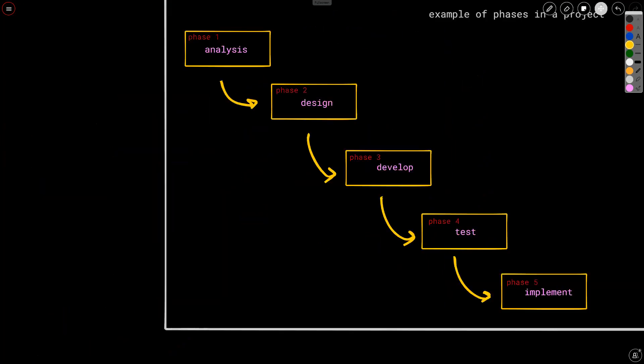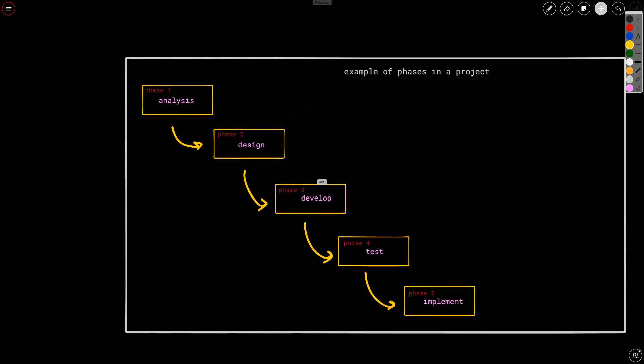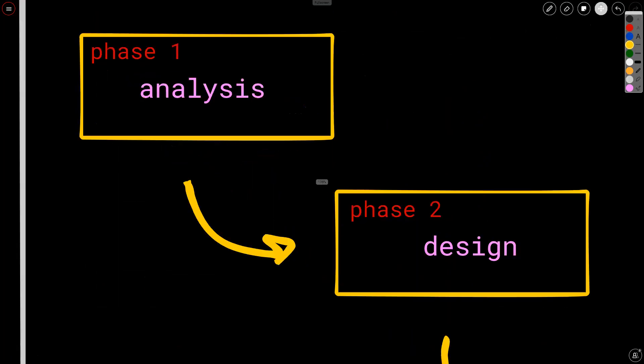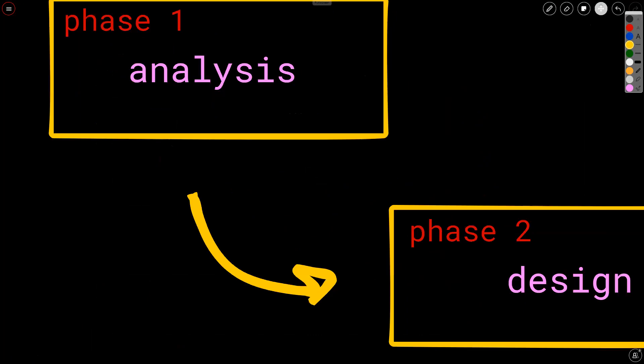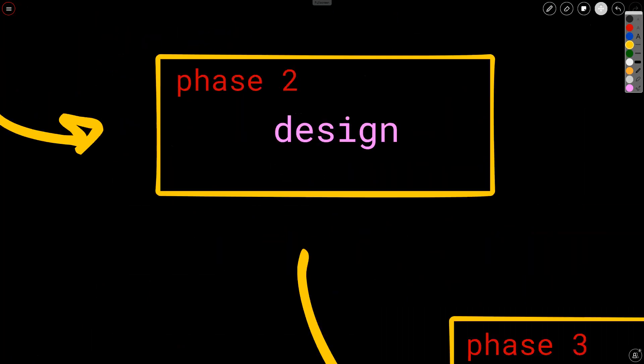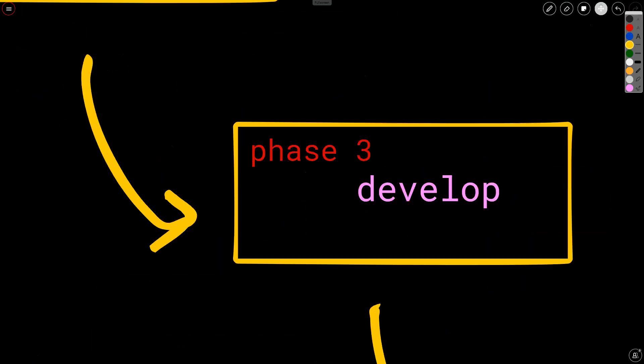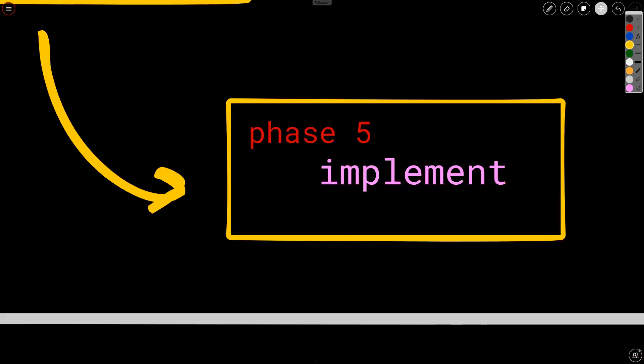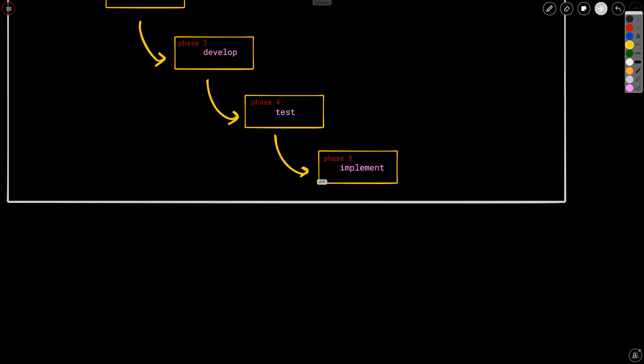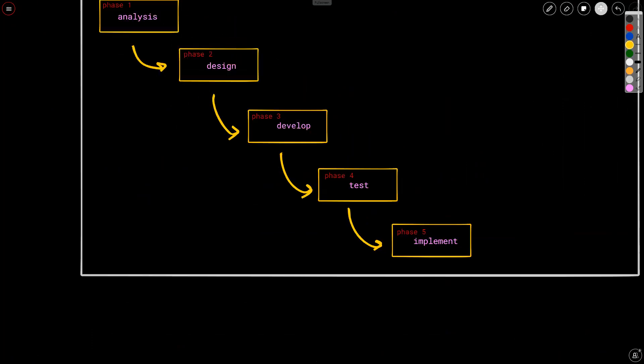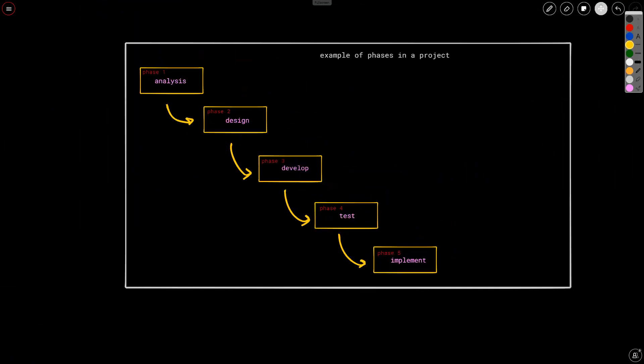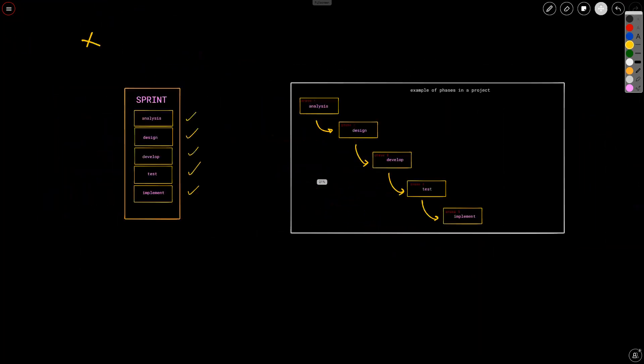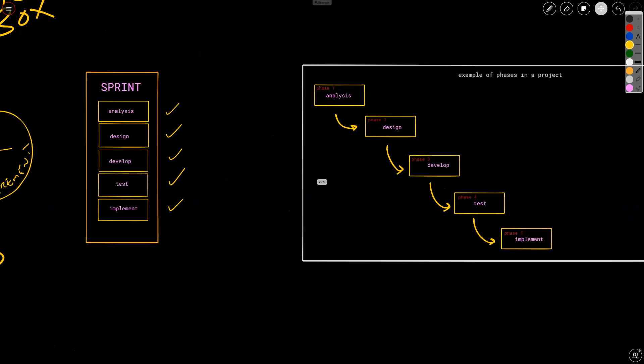Now, conversely, in the world of phases in a project, we would break down analysis into phase one, design into phase two, development into phase three, for example, testing into phase four, and we could say implement is phase five. That's how it works in the world of traditional project management. So take a look at these two together. What do you notice? Everything is done in a sprint. But in the world of project management, traditionally, we break things down into phases and everything is done in the project. Everything is not done in the phase. It is done in the project.